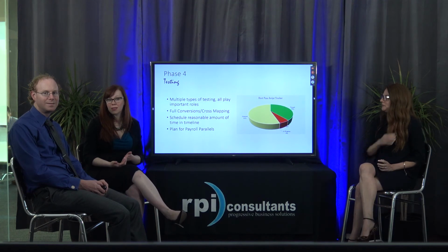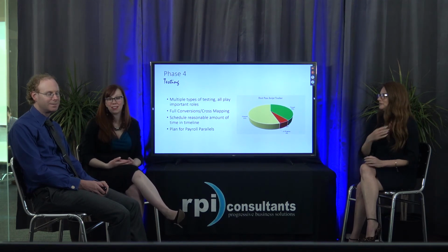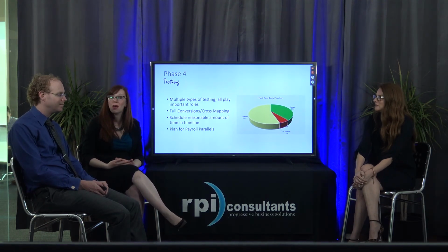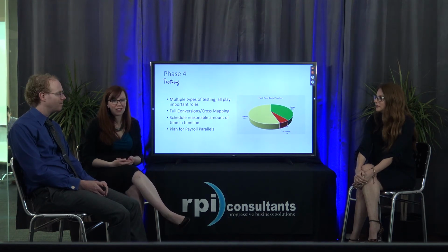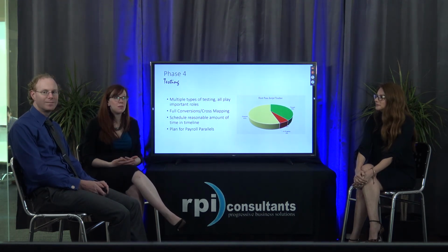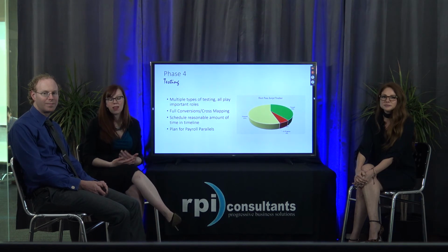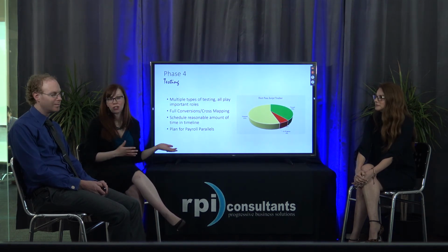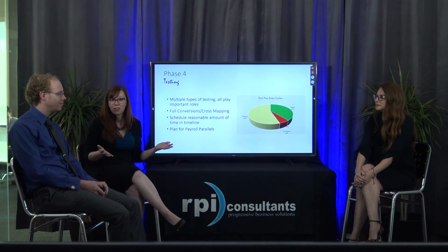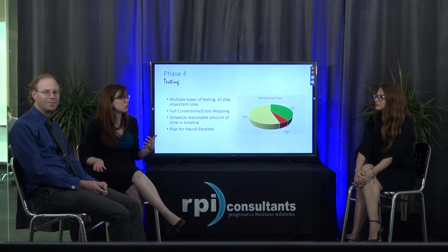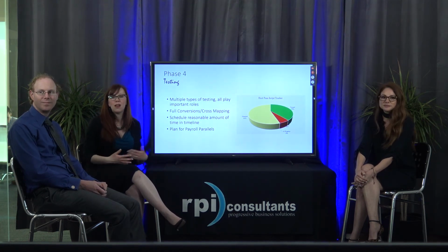And I don't want to forget to mention, I know we keep coming back to the finance and payroll involvement, but a really crucial element of testing is also to run a minimum of 2 parallel payrolls. Sometimes this is done in conjunction with your testing phases, and sometimes, based on schedules or the way clients want to approach it, we would schedule those separately as almost a 4th testing phase.